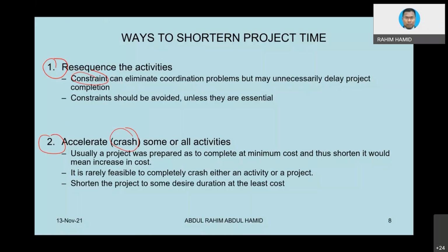So you must basically focus on this wording here. Shorten the project to some desired duration. We do not simply shorten the project duration for no reason. There must be reason, because later on when we show you example, then you are going to see sometimes when you choose the wrong activity to be shortened, not only you will increase the cost of the project, but also that activity will not affect the overall project duration. So meaning to say you are wasting your time.